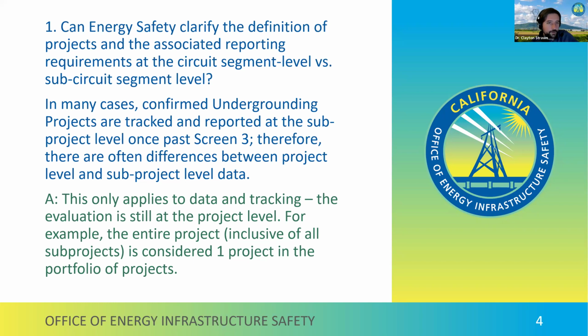So our answer for this one, or at least what we want to say about this, is that most of the data that we're collecting, anything on risk evaluation, risk assessment, is all done at the project level, which for us in the guidelines is based on the circuit segment. So any more granular information than that isn't used for the screens. It's not actually recorded at this more granular level, except in the spatial data where you will submit specific undergrounded segments.